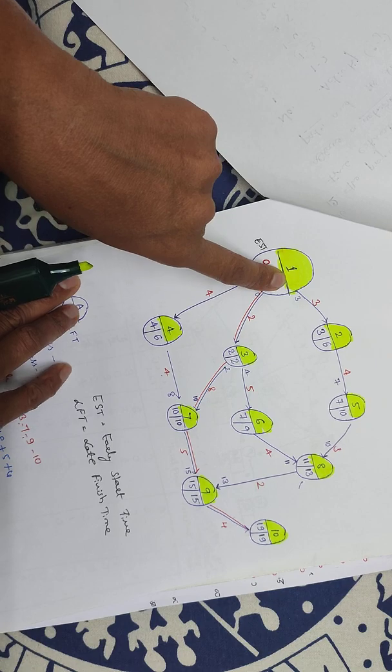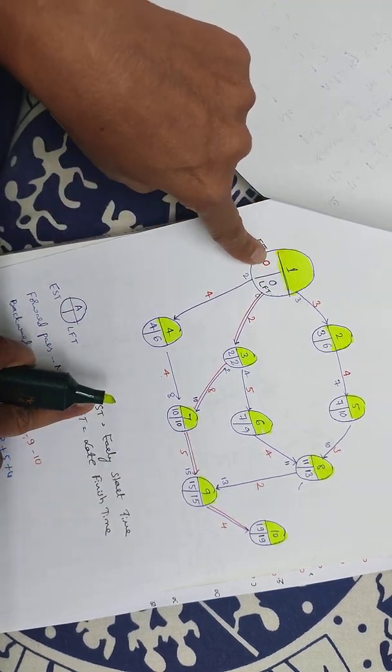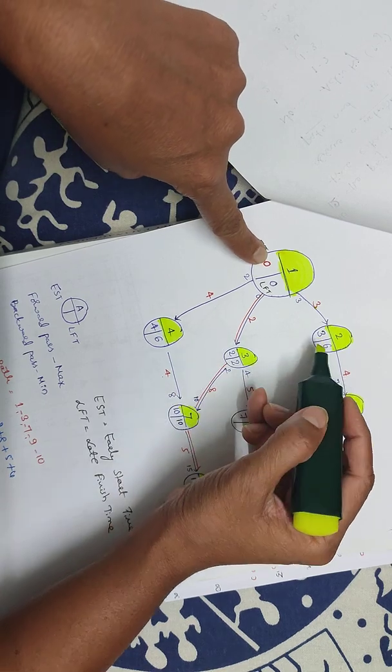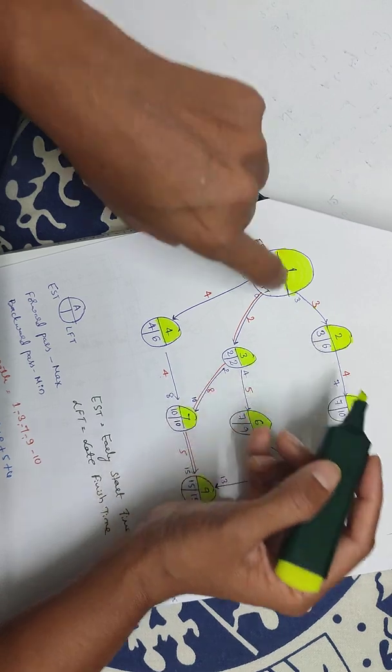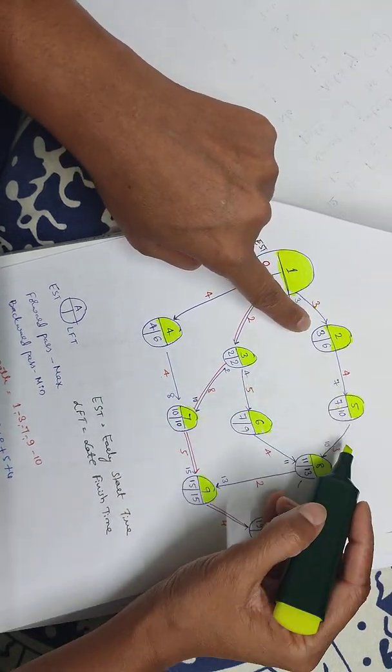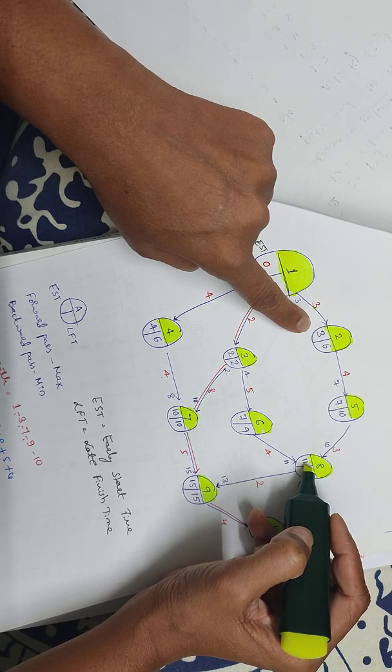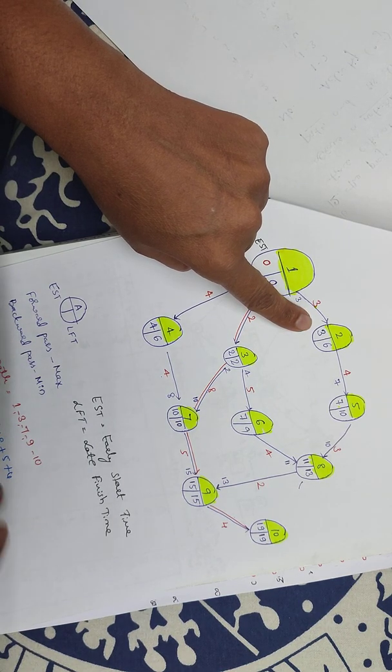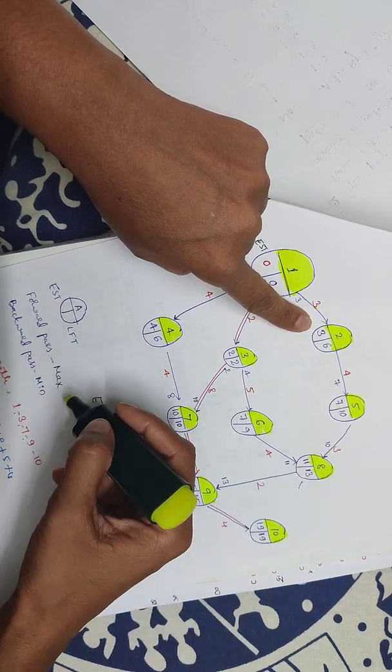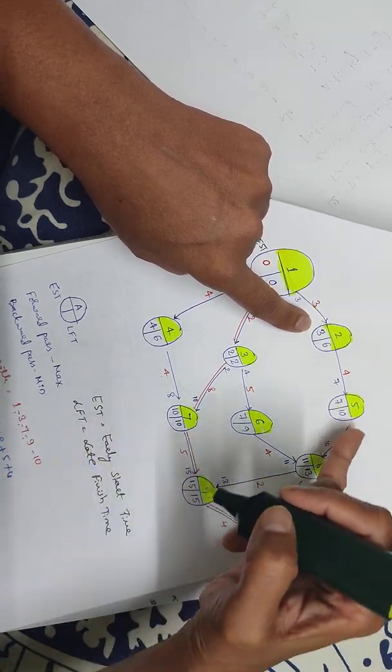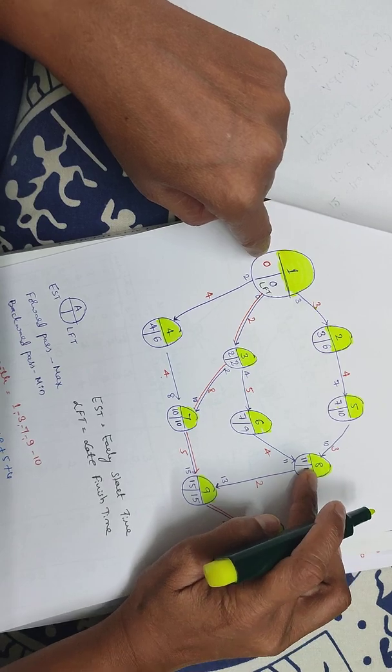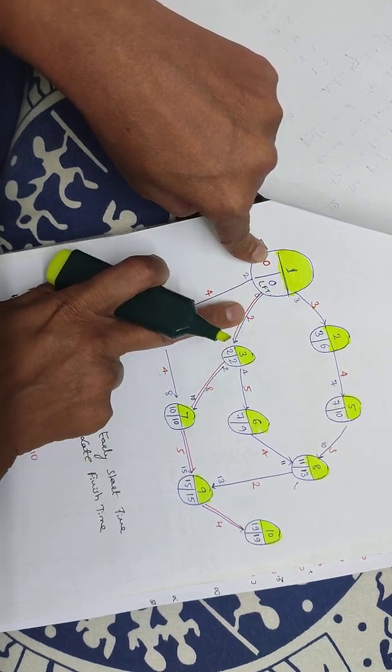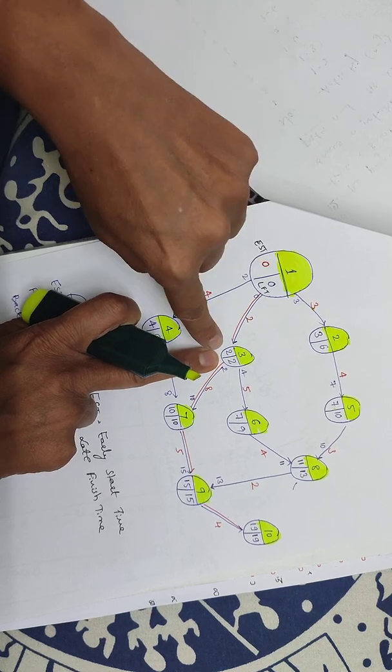Next calculation: early start time plus duration. For the second activity, early start time 0 plus 3 equals 3. 3 plus 4 equals 7. 7 plus 3 equals 11. In forward pass, when two arrows come, we take the maximum. At node 6, 5, 8, 7, 10.